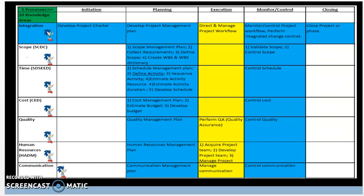The Define Activities Process is used to identify and document specific actions to be performed to produce project deliverables — which can be a product, service, or result. The key benefit of the Define Activities Process is to decompose the work packages in the Work Breakdown Structure into a list of several activities, which are used as a basis for estimating, scheduling, executing, monitoring, and controlling the project work. This will assist in efficiently producing project deliverables for the end client.